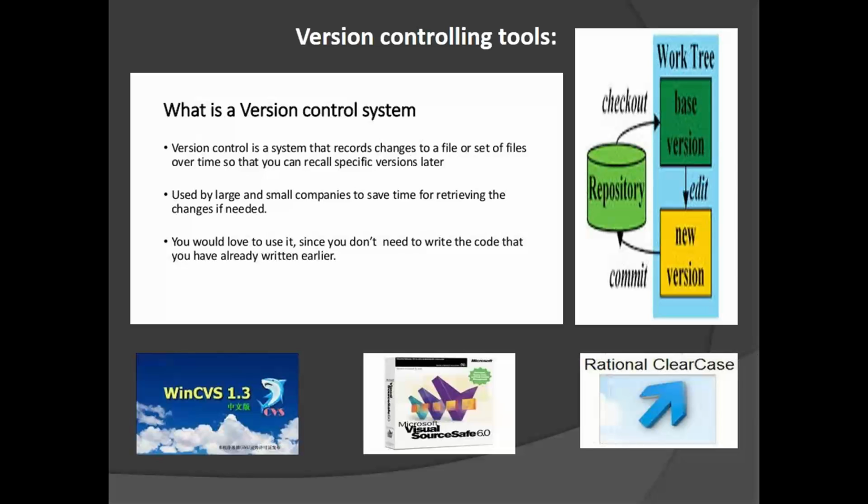Okay. Technically, changes will be done by developers and functionally the changes will be done by BAs. Now if you are changing the version, you have to update your SRS document also. You take a copy of that SRS document and rename it as SRS underscore 2.0, and in 2.0 you show these changes. At that time you specify the timestamp, on which date and time the changes were done, who has done the changes, and what those changes are.